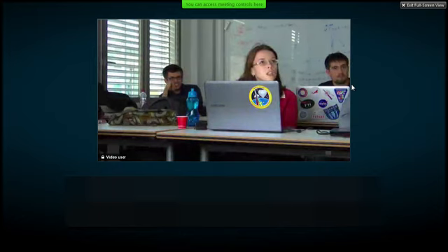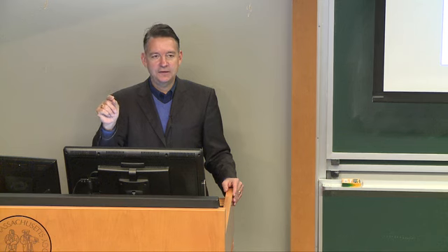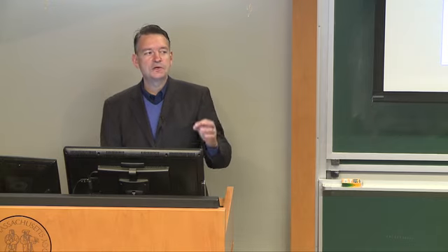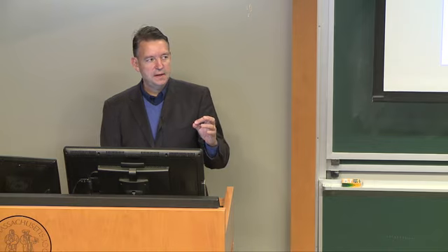Yeah, so the actual launch itself, of course, has the launch countdown, and you can stop the launch if certain things don't happen. So this is a review. The FRR is more like a CDR, so the countdown hasn't actually started yet. But if you successfully pass the FRR, that's when you begin the countdown. The official countdown starts. And then you still have a possibility, of course, of stopping the launch. But in terms of a formal programmatic review, this is your last chance.